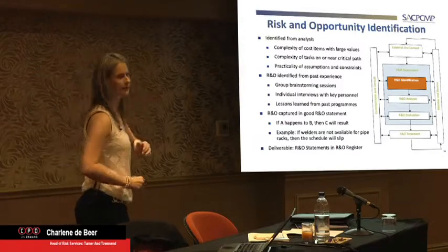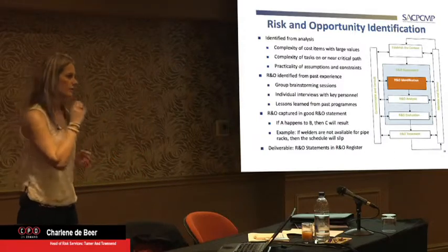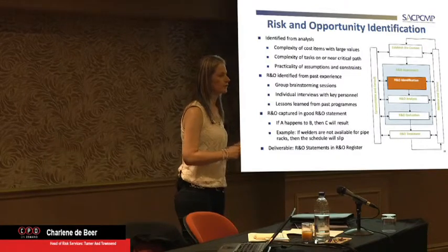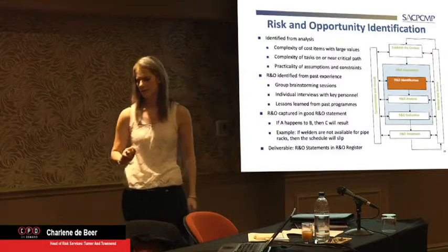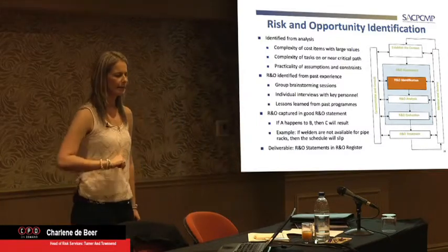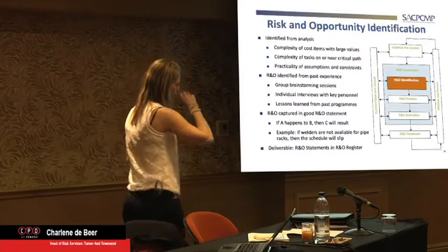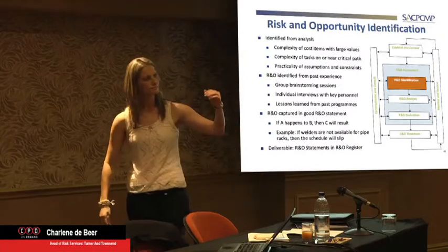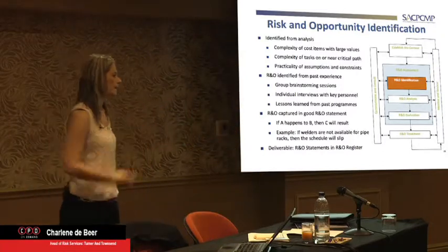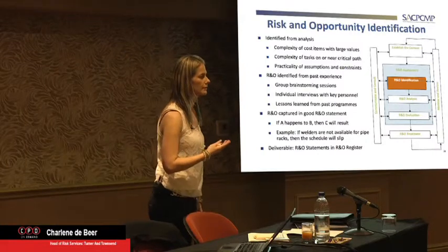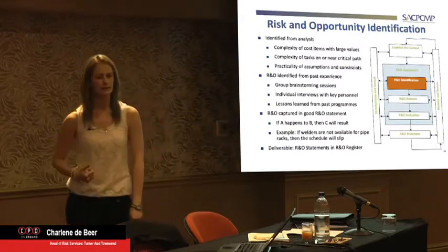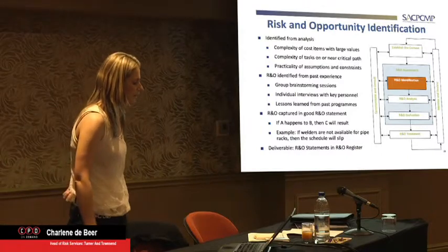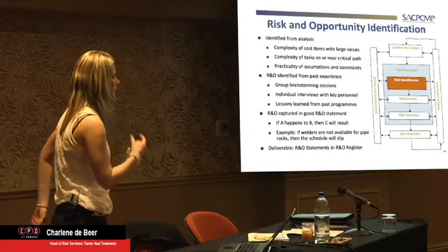So when we say we prioritize risks, you can do one of 3 things. If you look from a strategy enterprise way, they usually will rank risks, and we'll get to a risk matrix now and explain how that works, they will usually rank it on what might have the biggest impact on reputation, environmental, revenue, etc. Whereas from a project point of view, we would usually prioritize risk by what's going to have the biggest delay on schedule or what's going to cost the project the most money, for example. So we need to look at how complex the cost items are.